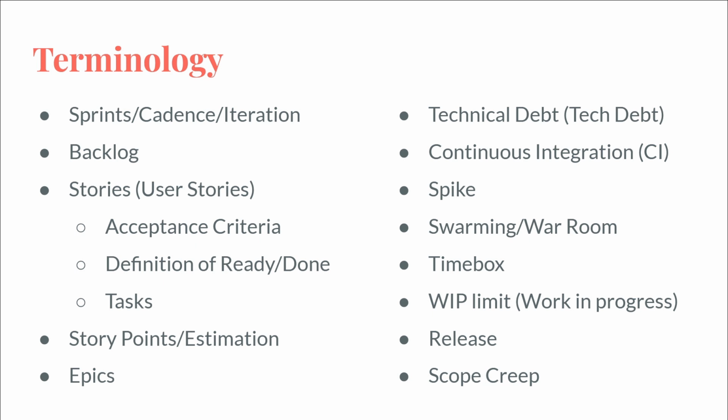But expect the earliest possible will be 3 months, but more likely it'll take a little bit longer than that. Worst case scenario, 6 months, right? That's a way for a project manager to say, this is something realistic as to the timeline.